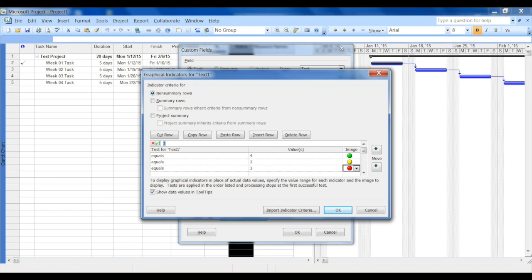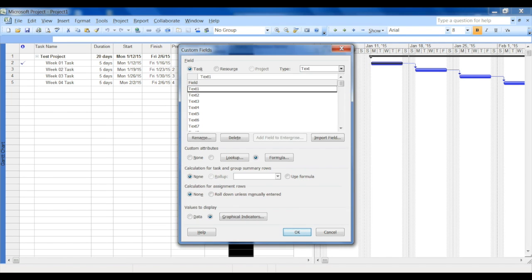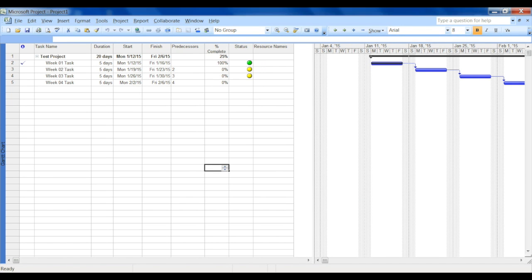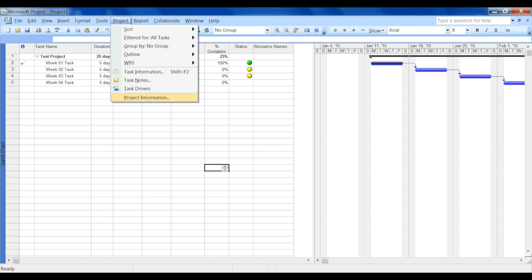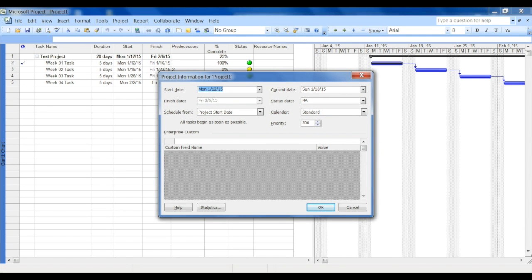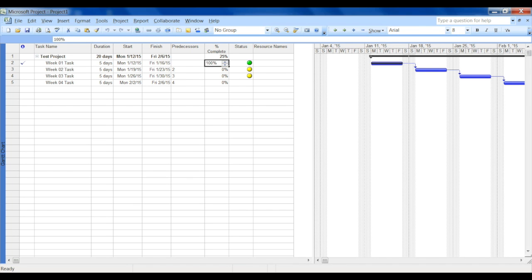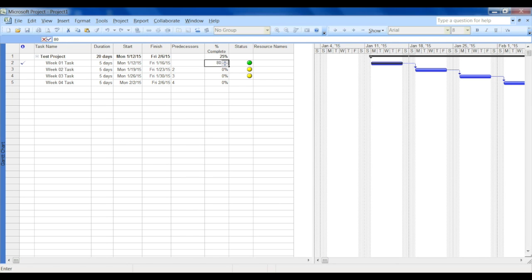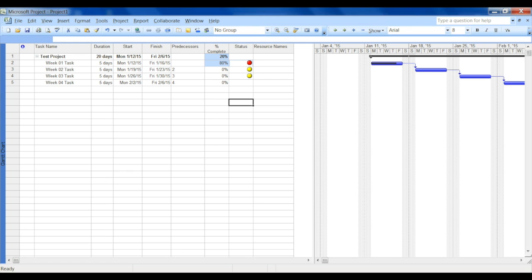Now if you go back and see, if today is, as per the project, the current date is 18th and the first task was supposed to complete on 16th. Let's say if it was not completed, that means it's delayed. In that case the status should show me as red. So let's make it 80%, which means it's not 100% complete, so the status now turns to red. So that's an easy way for me to go through the status column and see what are the things that need attention and what are the things that are delayed.